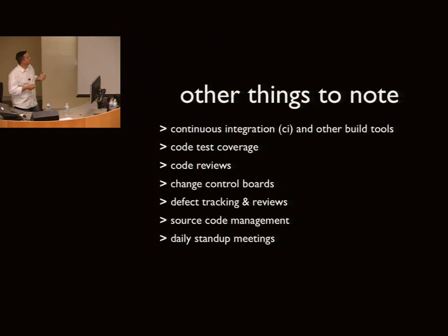But the basic idea is that everything in your production environment is locked down. And anytime you want to make a change to that, you have to open one of these requests, a change request. And it's going to ask you all kinds of questions, like what are you doing, why are you doing it, and if it doesn't work, what's your plan to restore functionality? One of the key things it's going to ask you is what is the business risk of this change.